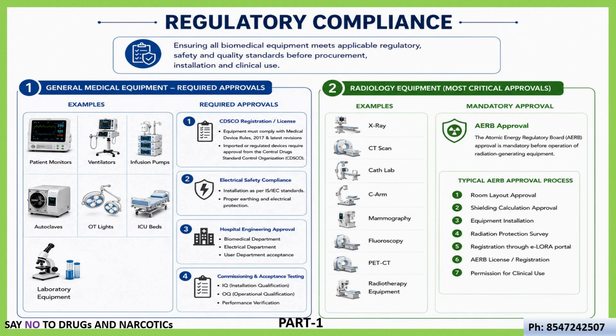Next is the regulatory compliance of the equipment. For a better understanding, I have divided entire hospital equipment into 5 categories. The first one is general medical equipment, which includes ventilator, OT lights, ICU bed, laboratory equipment, infusion pumps, etc. General medical equipment requires CDSCO registration license. CDSCO means Central Drugs Standard Control Organization approval, electrical safety compliances, hospital engineering approval, and commissioning and acceptance testing is required for general medical